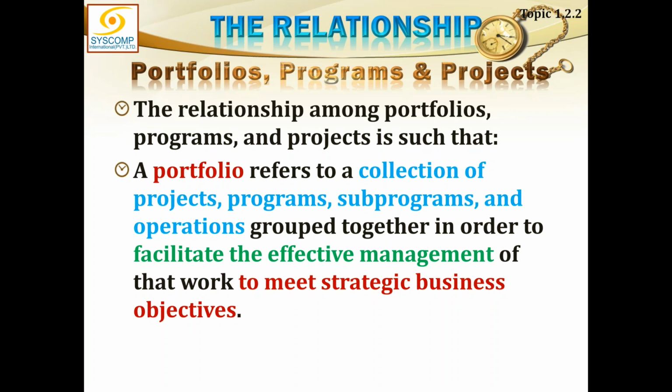Moreover, it provides the strategically important resources to the most important high prioritized projects or programs. It also realizes which projects or programs are no more required and therefore they must be closed. And it also creates and analyzes the business cases of new projects and programs which could be included into the portfolio. So this is the strategic business objective of the portfolio. It is not to be confused with the objective of a program or a project.